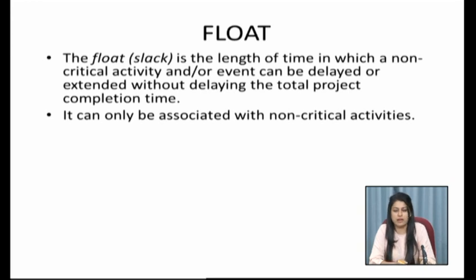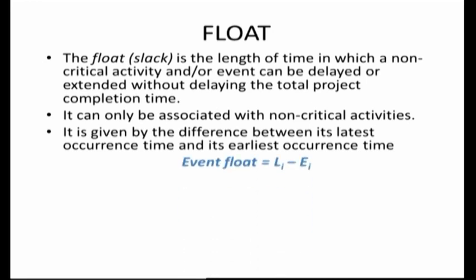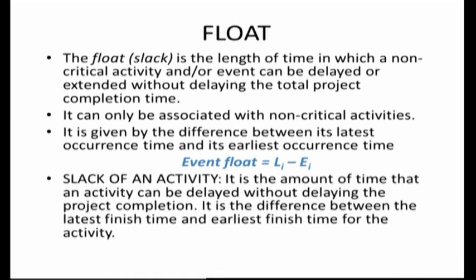because only then we get the buffer time in between. It is given by the difference between its latest occurrence time and its earliest occurrence time, as we just discussed. Event float is equal to Li minus Ei. Slack, or the float of an activity, can be stated as the amount of time that an activity can be delayed without delaying the project completion. It is the difference between the latest finish time and the earliest finish time for the activity.